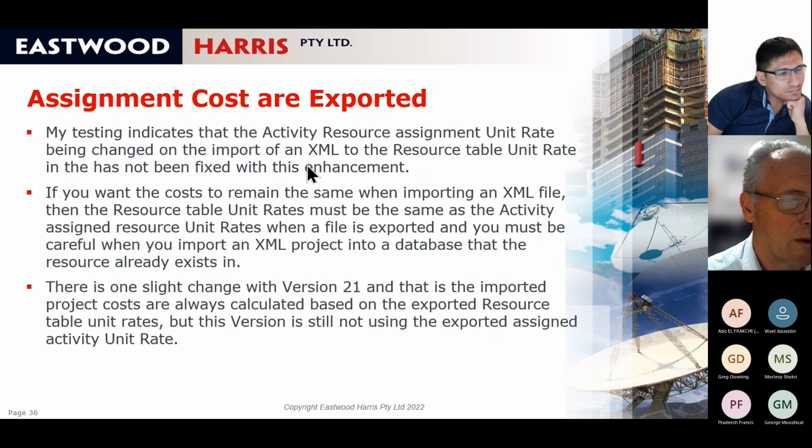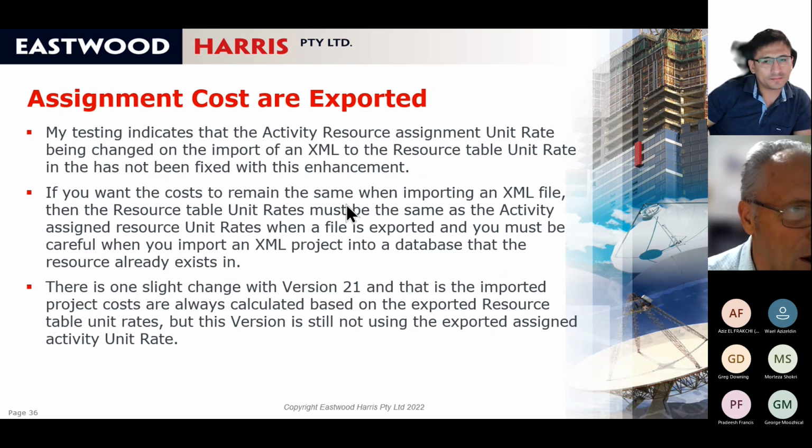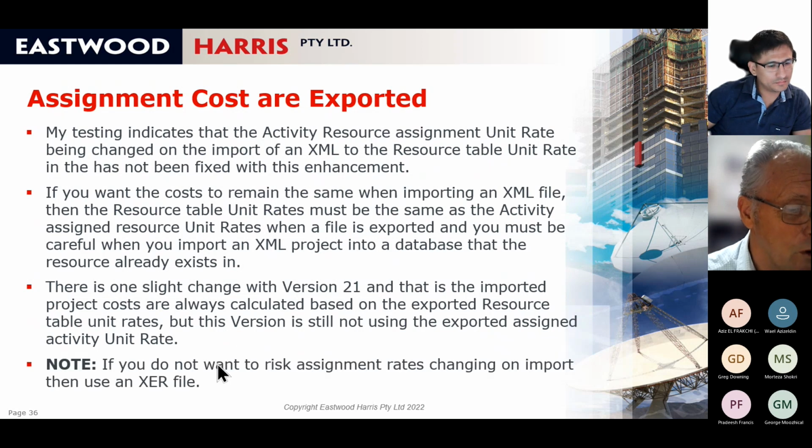I went into quite a lot of detail, and this is basically what I'm saying. Keep all your resource rates the same in the source and target databases, or if you export and import with XML, use XER instead. If you import and export with an XER, the cost won't change as long as you don't recalculate assignment costs. This is a real nightmare in my opinion. So if you do not want the risk of assignment costs changing on import, then use an XER file.